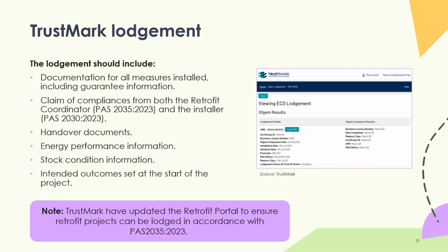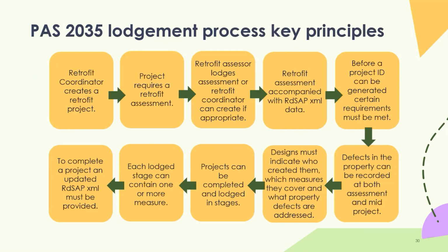So for each project, you basically have a sort of file, if you like, a case file with Trustmark, and all that, as I say, all the important documents associated with that project. It is the responsibility of the retrofit coordinator to upload all the important documentation to the Trustmark data warehouse. Just a simple diagram of the lodgement process.